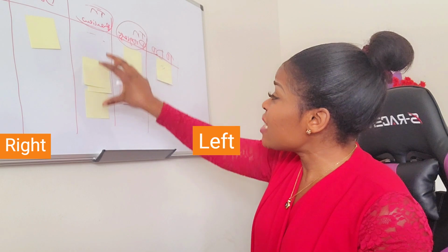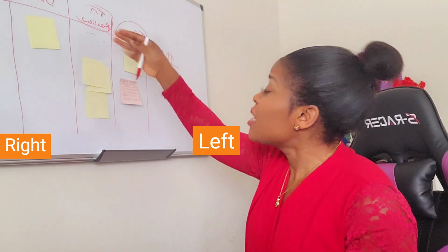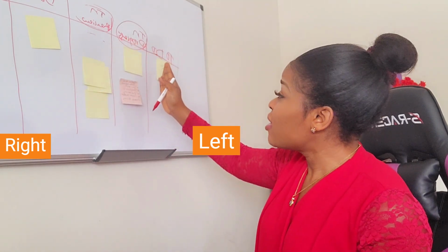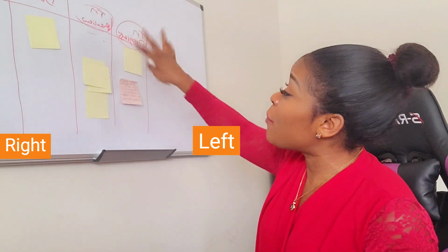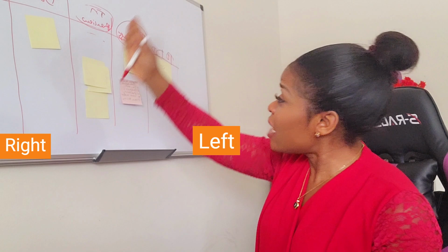No, if I see that we are beginning to have so many things open here based on our WIP limits, let us discuss them, let us address them, and then we are moving all the way. You see, instead of just talking randomly about, oh, yesterday I did that, today I plan to do this, and these are my impediments. No, let's talk about this.